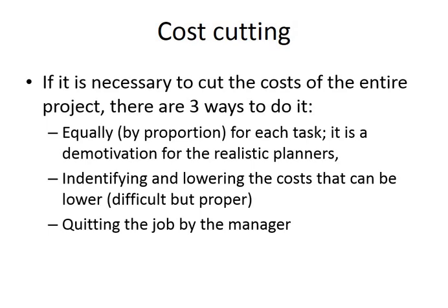I mean, equally, so you cut for each task, which basically is usually not the best choice because some tasks are crucial and just cannot be finished if you decrease the amount of money spent on them. Of course, you can quit your job as a project manager, but it doesn't solve the case either.